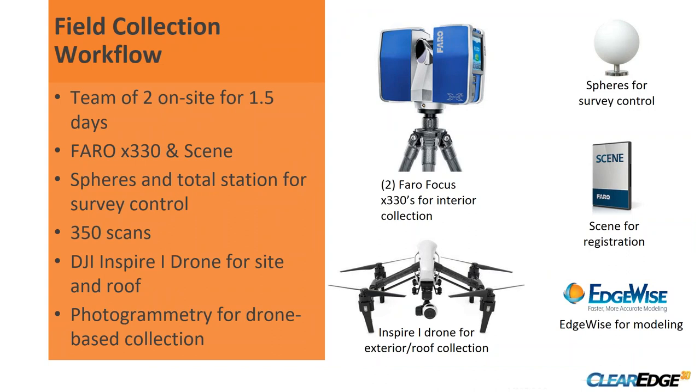So some of the tools that we used here. Tools and team. There were two of us that went out to the project site. We hit it up with two scanners to get it done quick and easy. We found, or actually find often in our workflow, that when you put two scanners on a job site at once, it's actually more than double the productivity, just because there's a lot of efficiencies.